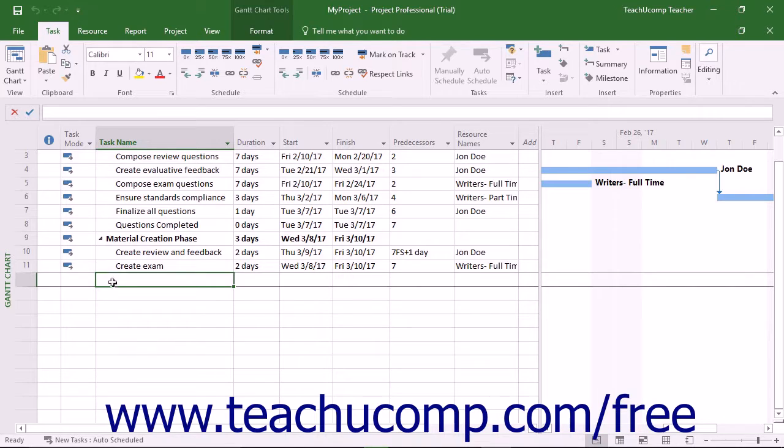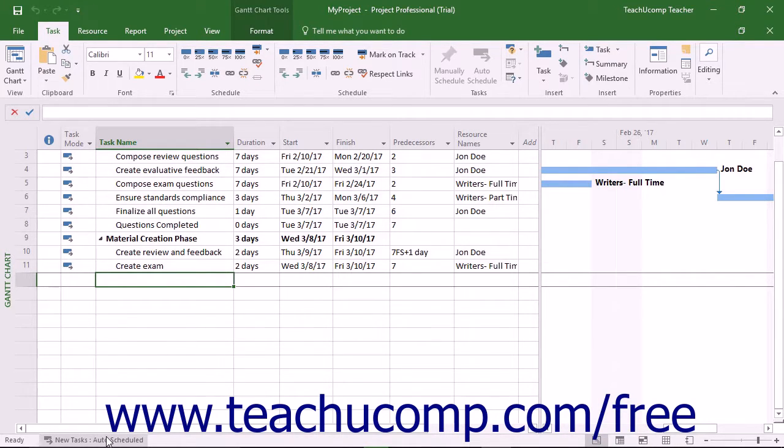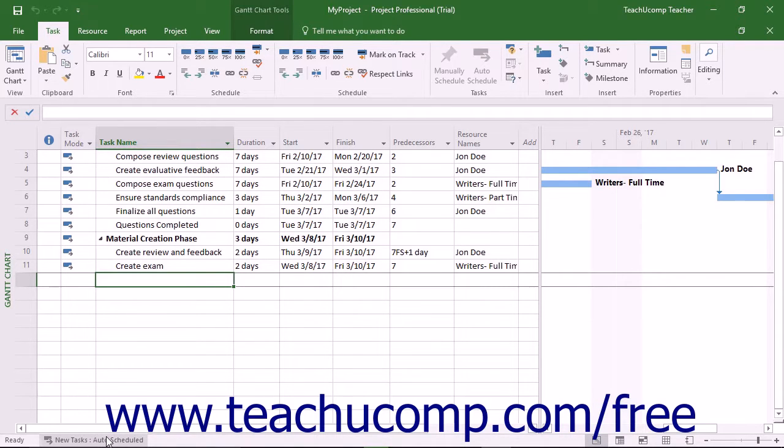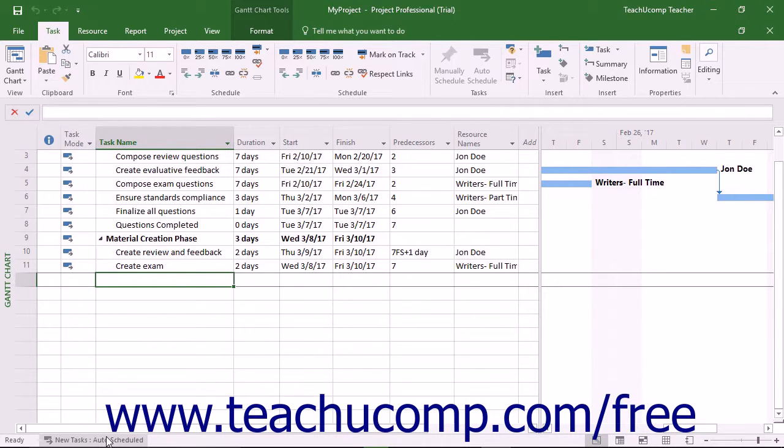Next to the cell mode indicator, you will see the Task mode indicator. This determines how Project schedules new tasks. It defaults to new tasks manually scheduled, but you can click it to change it to new tasks auto-scheduled. When you then create new tasks in your project, this setting determines how the task dependencies will relate to each other when the tasks are linked within a project.